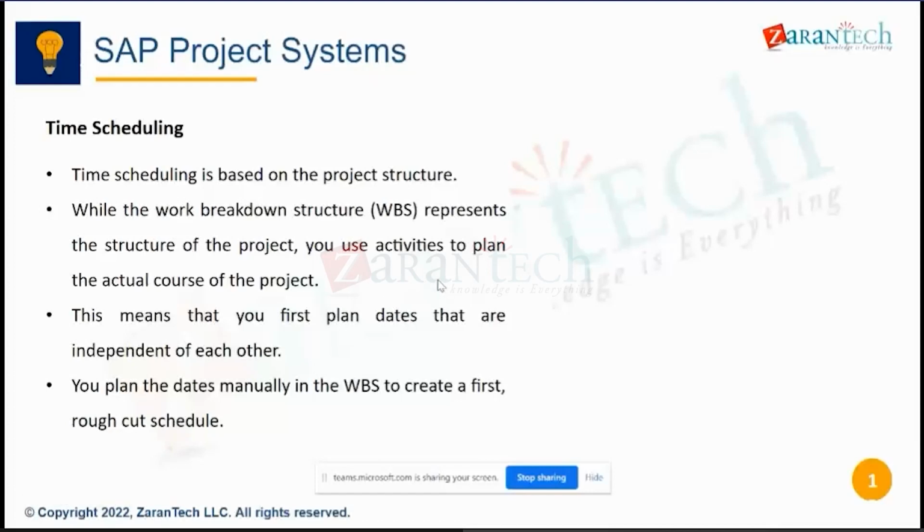I have to complete my solution document requirements, and only then will I start my configuration. Then after that only I will identify what the custom objects are, if the fit gap I will do. After that only I will start development of custom objects. Then after this is done, I will do my unit testing after configuration. Then I will do system testing or integration testing. After I've done that, then only I will do UAT. So those are activities and the relationships between the activities.